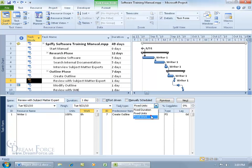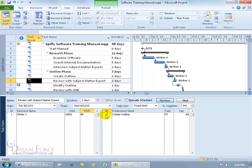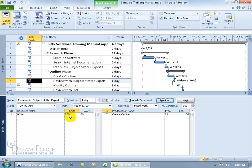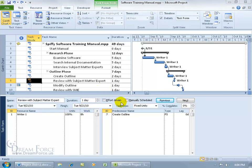Then we can try fixed work. With fixed work, the work will always be 8 hours. Even if I change the duration to 2 days and reduce it back to 1 day, and reduce the units to 50% and click OK — it's still going to be 8 hours of work, because the work has been fixed. So we're back to 1 day duration at 100%, 8 hours of work — 8 times 1 day equals 8 hours. As for deciding whether to use manually or automatically scheduled, I prefer automatic. The best use I find for manually scheduled mode is for summary tasks in top-down planning.